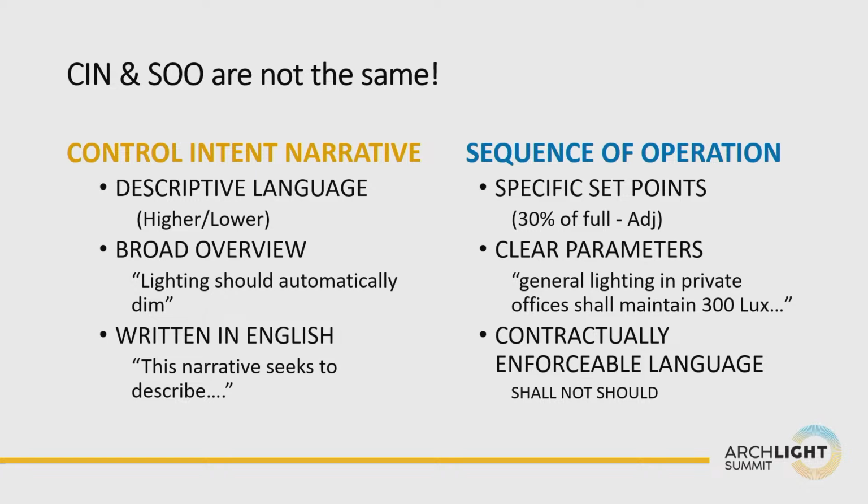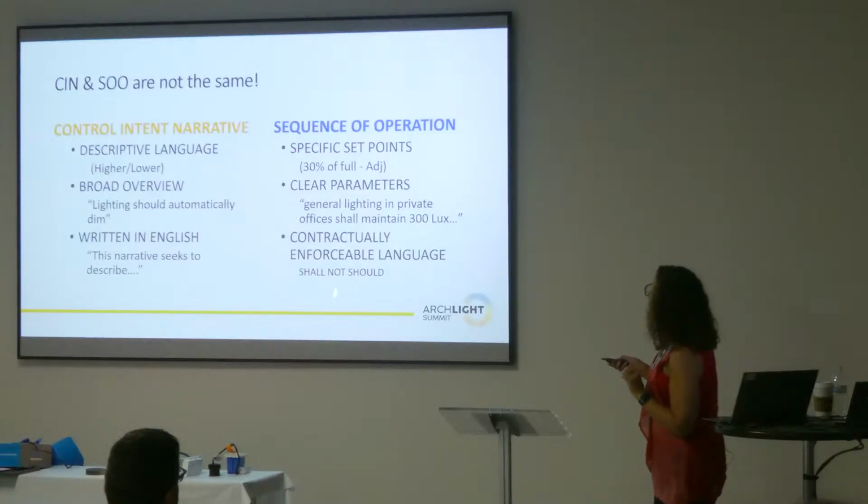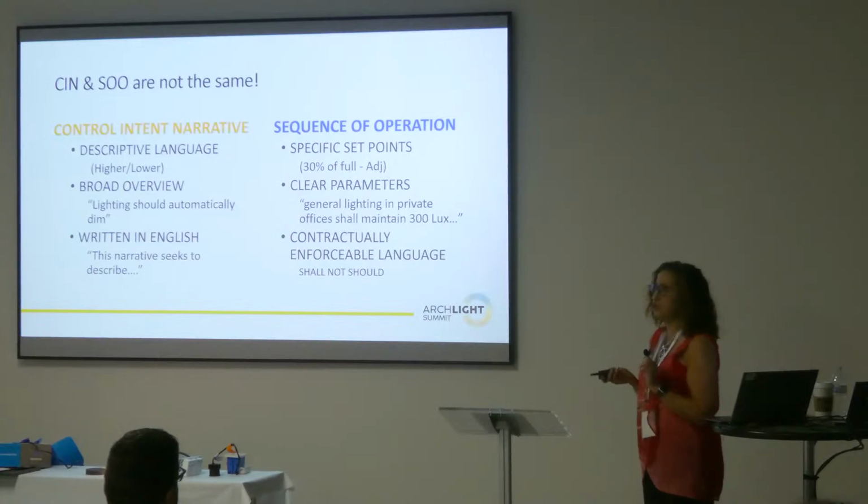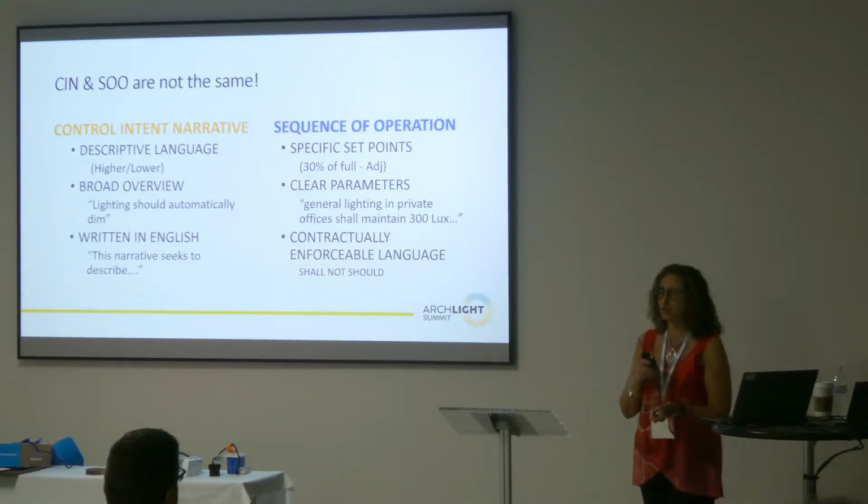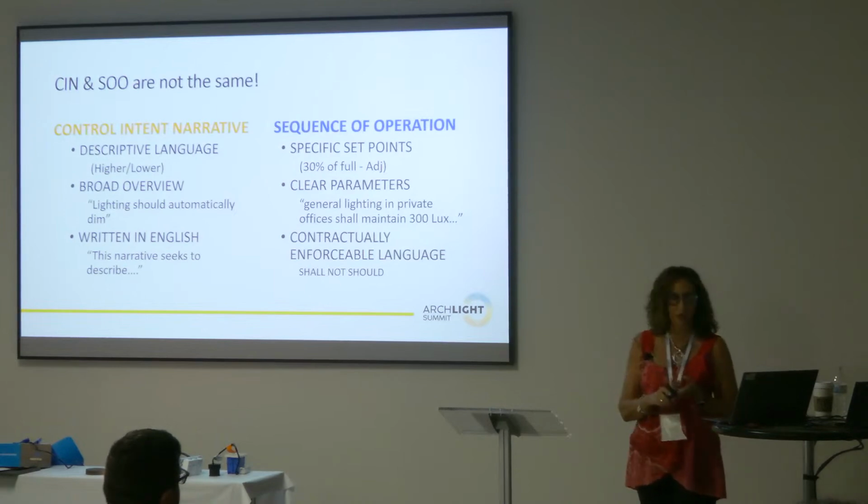And you want to always use the word shall. I don't know why this is, and I'm sure there's a lawyer out there who could tell me, but I know this to be true. The only word that you can use in writing a contractually enforceable specification is shall. Do not use will, do not use should, do not use must or may.